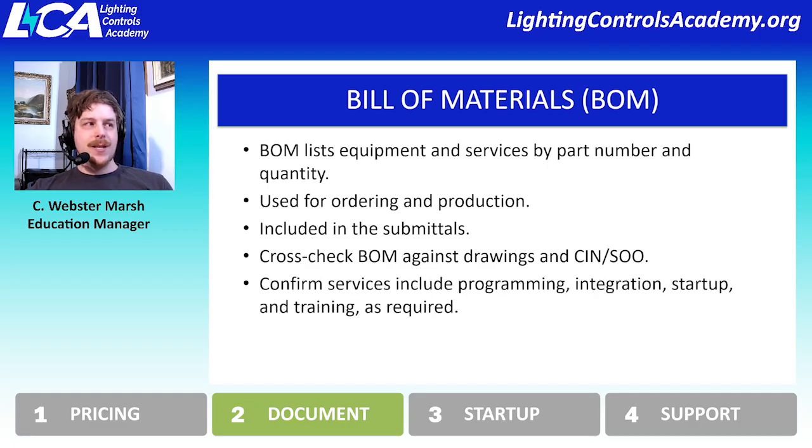And so with the services, you might see programming, integration, startup, and training. And all of these, I would say, for the most part, are required for most projects. Training is very critical and a lot of times overlooked or forgotten about because it happens so close to the end, and we'll talk a little bit more about training. But it's just good to confirm in the bill of material list that everything you need is included.